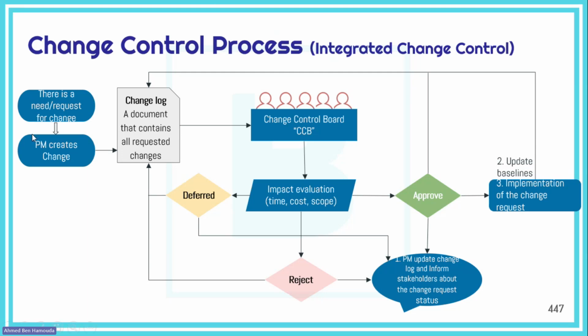The project manager generally is the one that creates the change request, even though anyone on the project could raise one. But the preferred way is for the stakeholders or the project team members to go through the project manager, to keep it synchronized and have just one channel of communication of changes to the change control board.